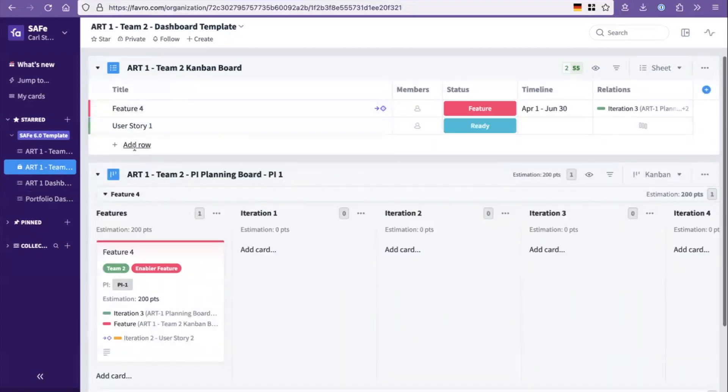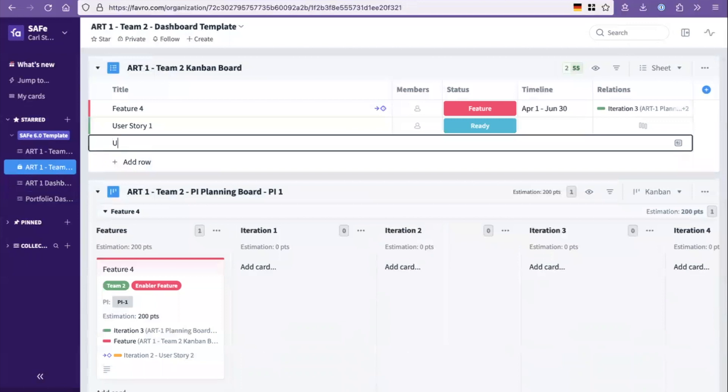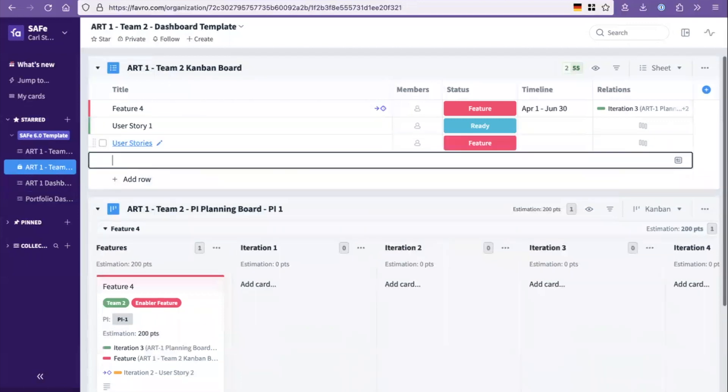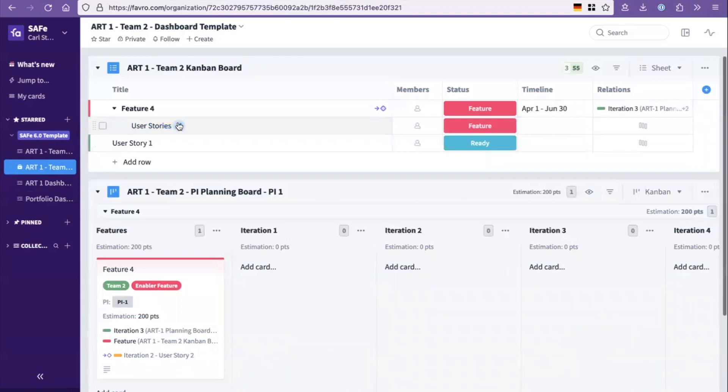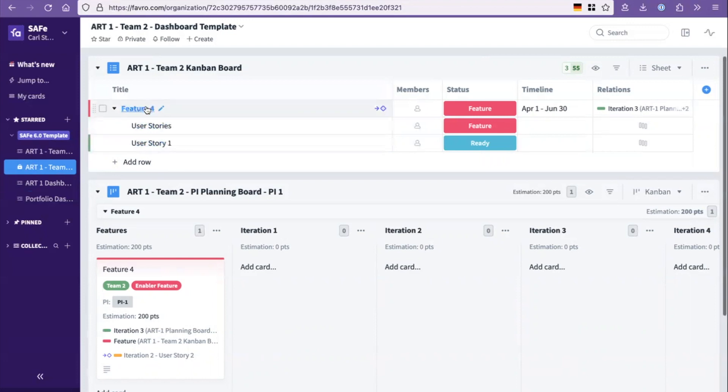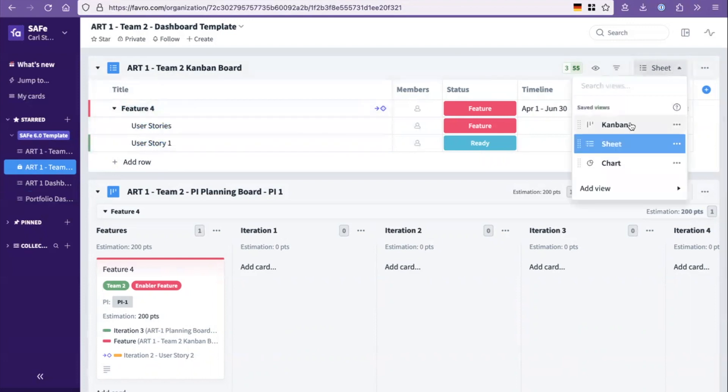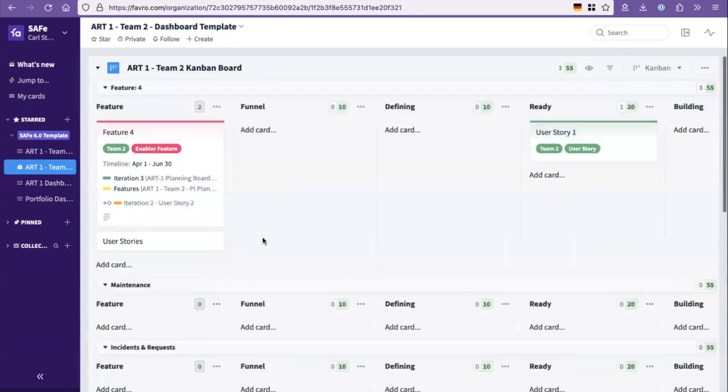And then we would add user stories. And then you link them to the feature like that. So that now means that these two user stories are building a feature number four. So switch back to the Kanban view.